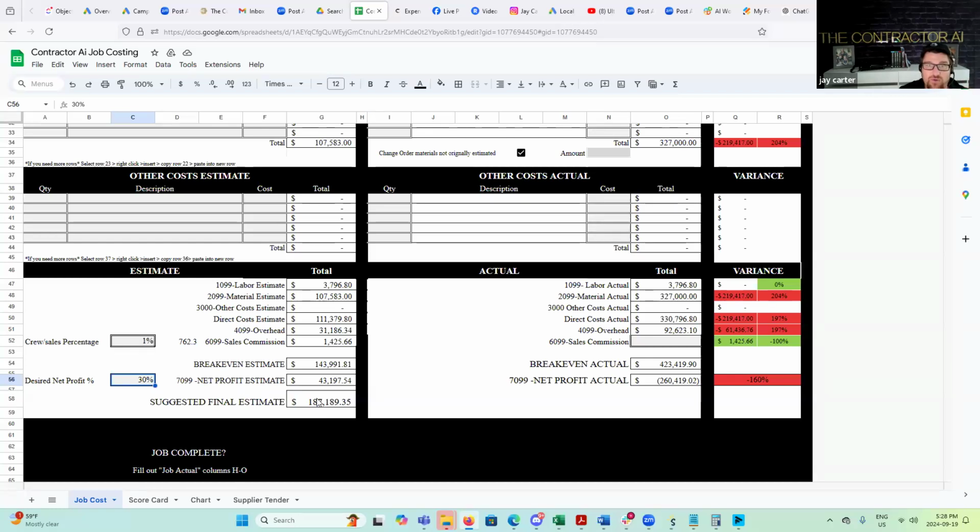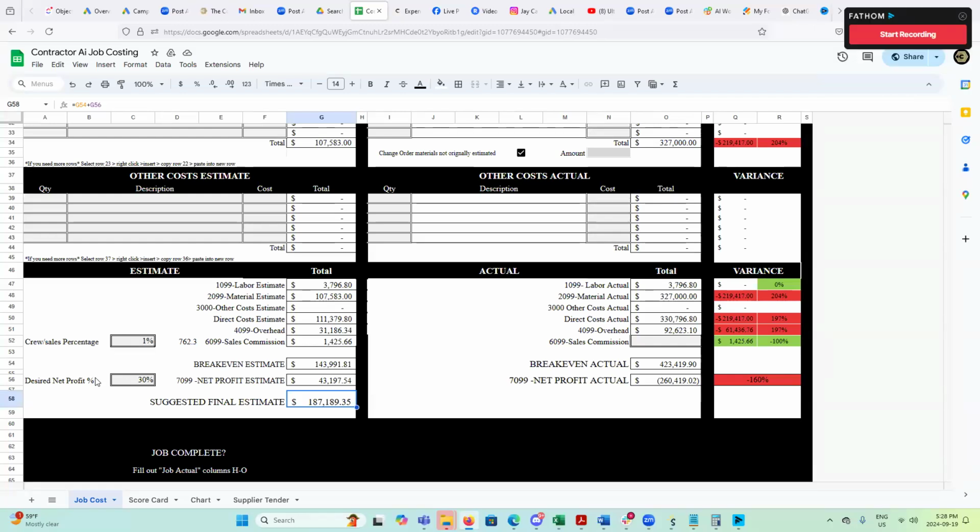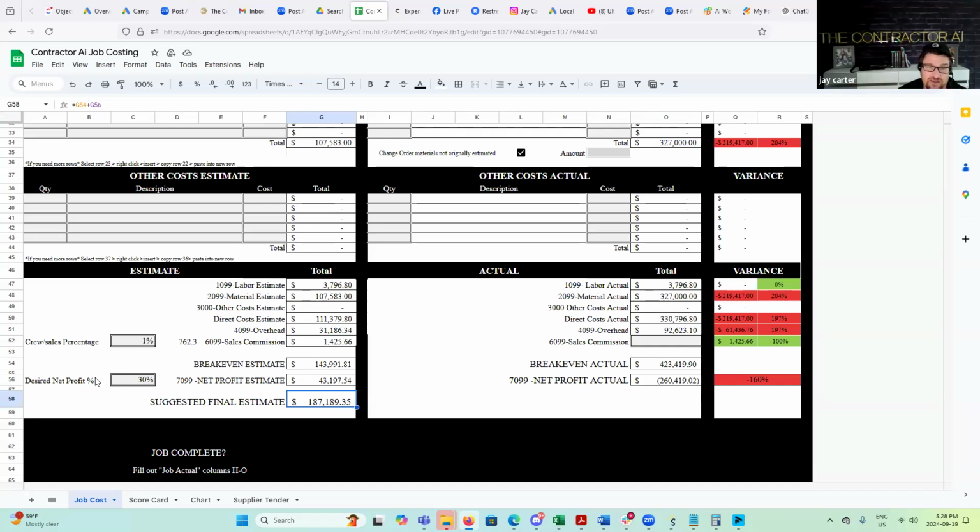Now we get to the place where we need to charge our price. Like I said, safe zone, 22 to 33%. Above that, you're going into professional selling. Expect to get no on every single job, and be able to work through objections well, have a good sales process, have a lot of marketing. Again, you want to work to get above that. Anything below that, down to about 10%, you can get by. You can survive. You will not thrive or have a business that will operate without you.